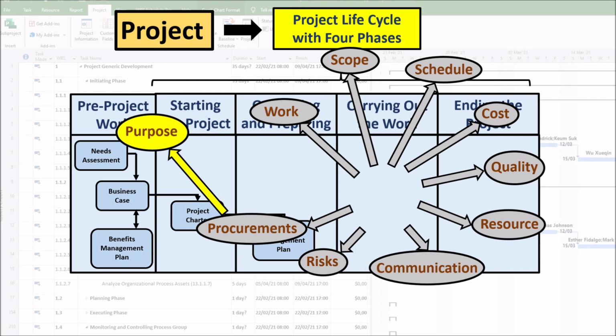And on larger projects where there are multiple suppliers to be managed, a key aspect of contract administration is managing communications between the various suppliers. Administrative activities may include: 1. Project data collection and records management, including detailed records of physical and financial performance and the establishment of performance indicators. 2. Refining procurement plans and schedules. 3. Setting up the collection, analysis, and reporting of procurement-related project data and preparing periodic reports for the organization. 4. Monitoring the procurement environment so that implementation can be facilitated or adjustments made, and 5.